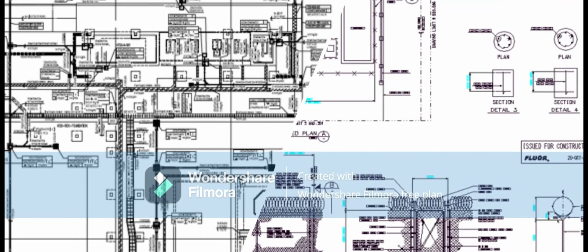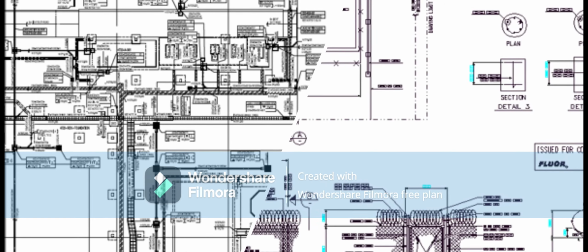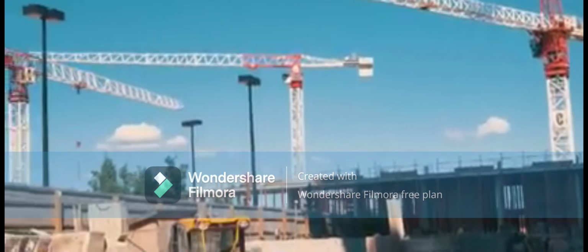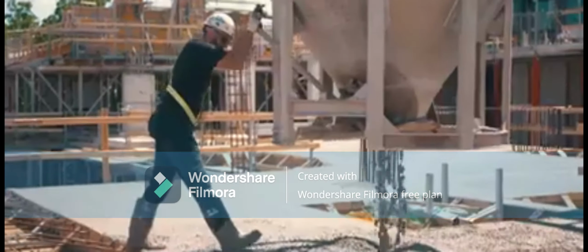Civil engineering and design. For any given project, there are three phases that the Manila Civil team may get involved in, namely, front-end engineering and design, or FEED, which deals with the conceptual designs done through engineering sketches and or FEED deliverables, detailed engineering and design, which are engineered and detailed deliverables, most often including a 3D model, and construction support. This may be through field support and or responding to RFIs or requests for information.